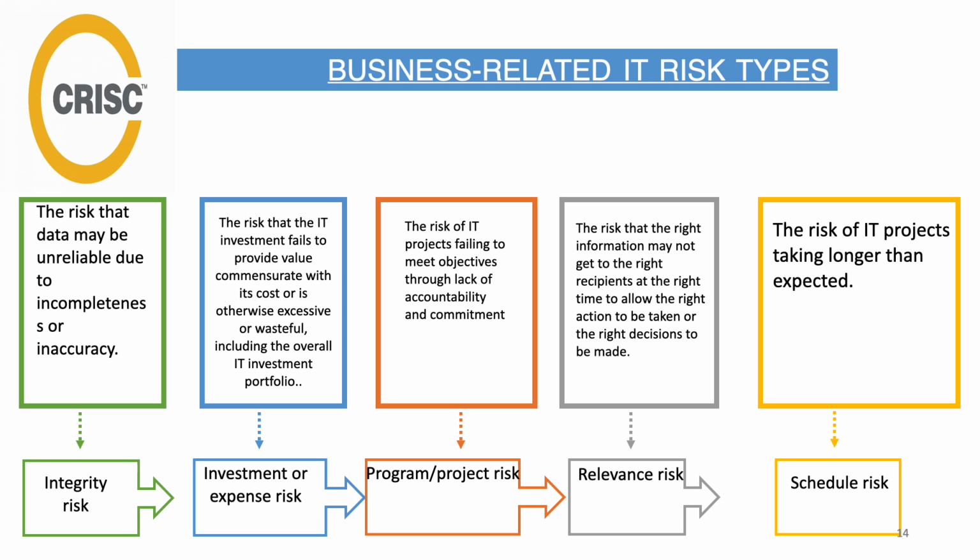Next, coming to the schedule risk. What is schedule risk? The risk of IT projects taking longer than expected. In this, the danger is that the IT plan takes longer than expected. Schedule risk analysis is a process to determine the achievability of a schedule and its chance of meeting the project's defined goal. Overall, we can say it is a quantitative analysis based on mathematical calculation, enabling the project to monitor potential schedule delay through the life of the project.